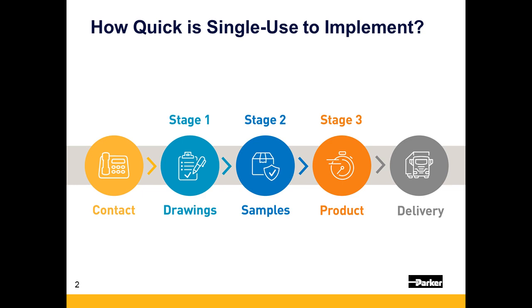These drawings would then be reviewed at least once by the end user, and in some situations there may be multiple revisions. So already the process may be into several weeks. Once the drawings are approved, the end user may require a sample for form, fit and function. And they may require the compliance data available for each individual component part, which, while it may be available, getting it is not always easy, and the data available may only be on non-irradiated components. Again, time is all adding up.